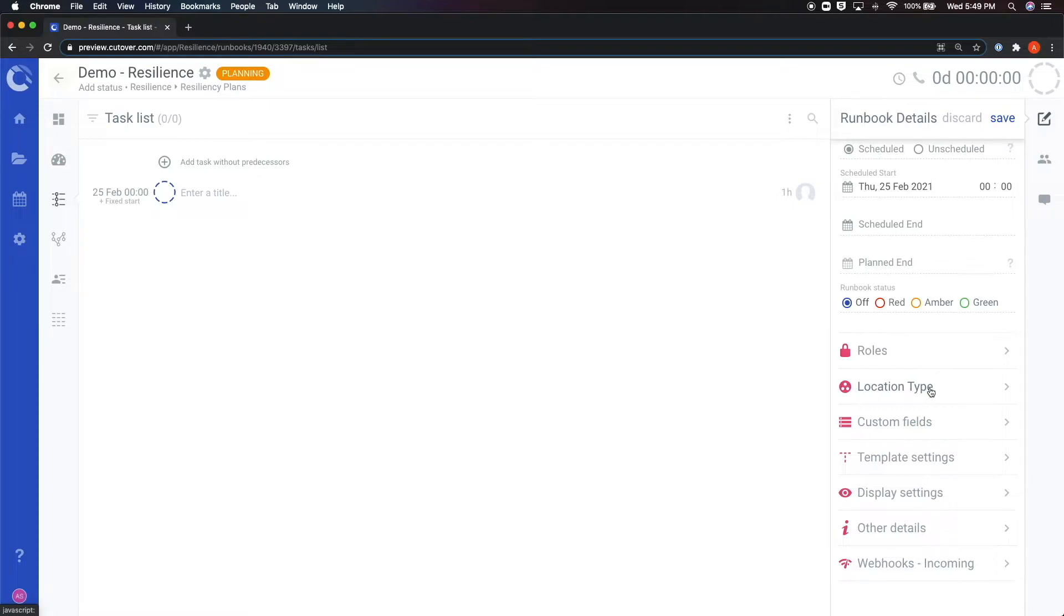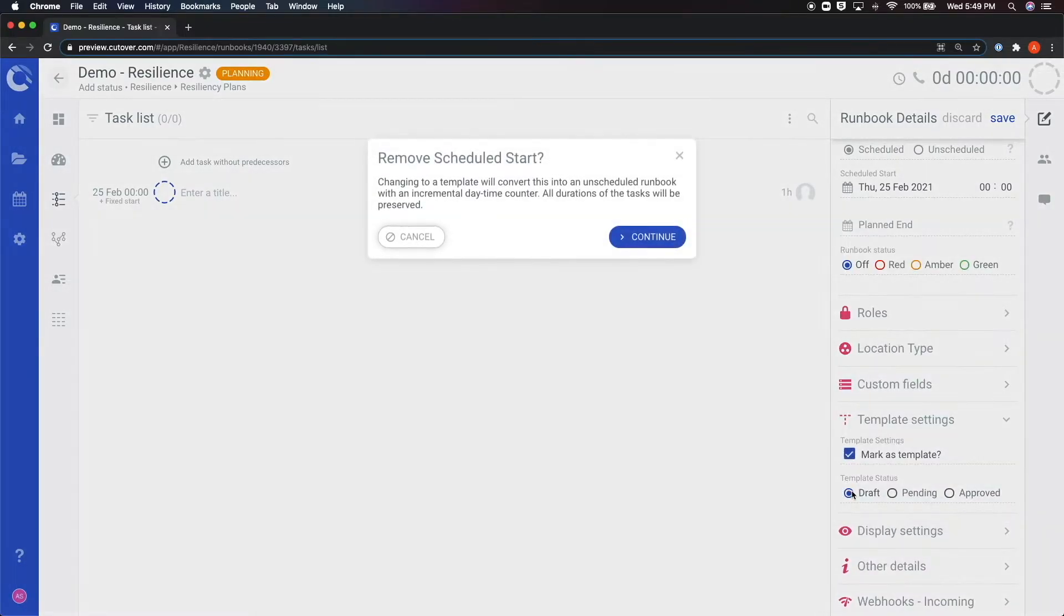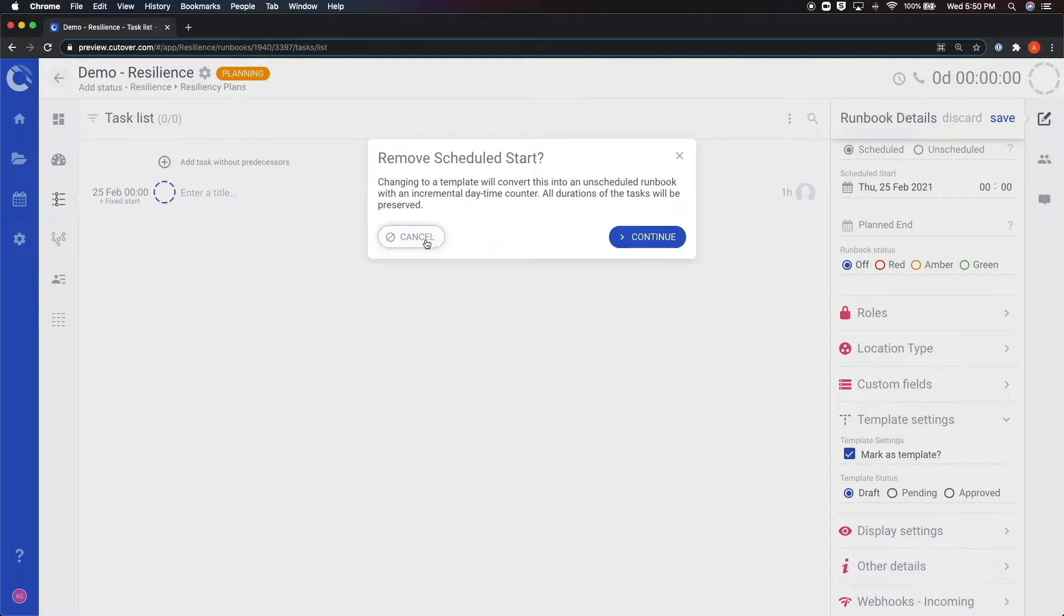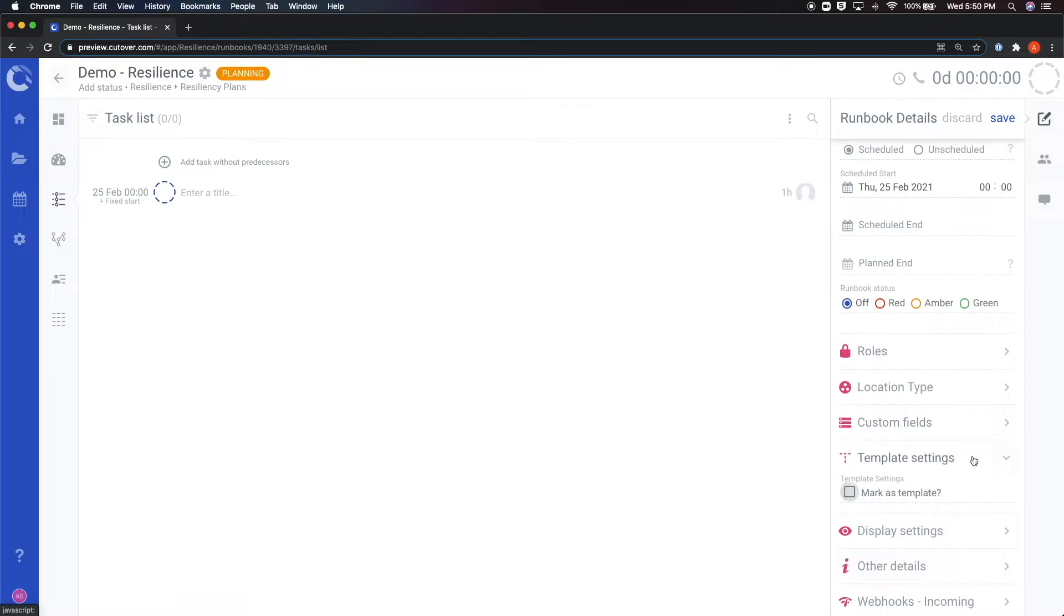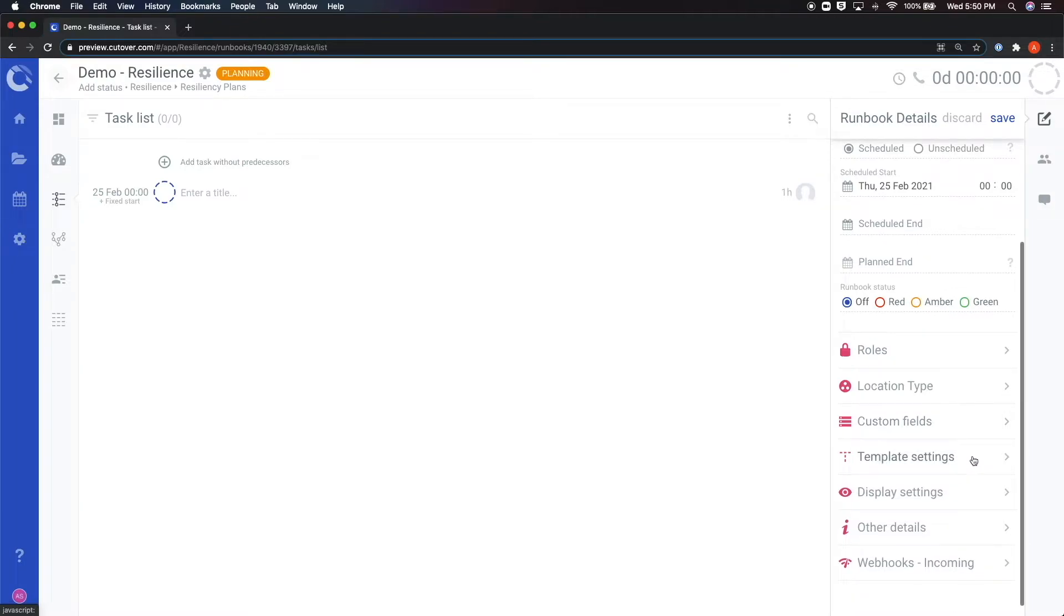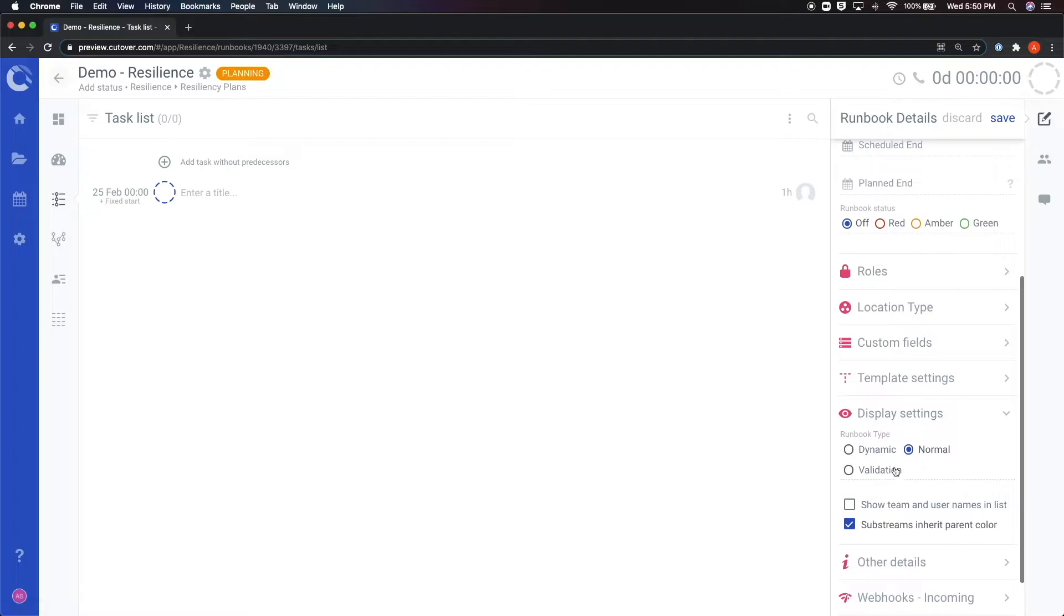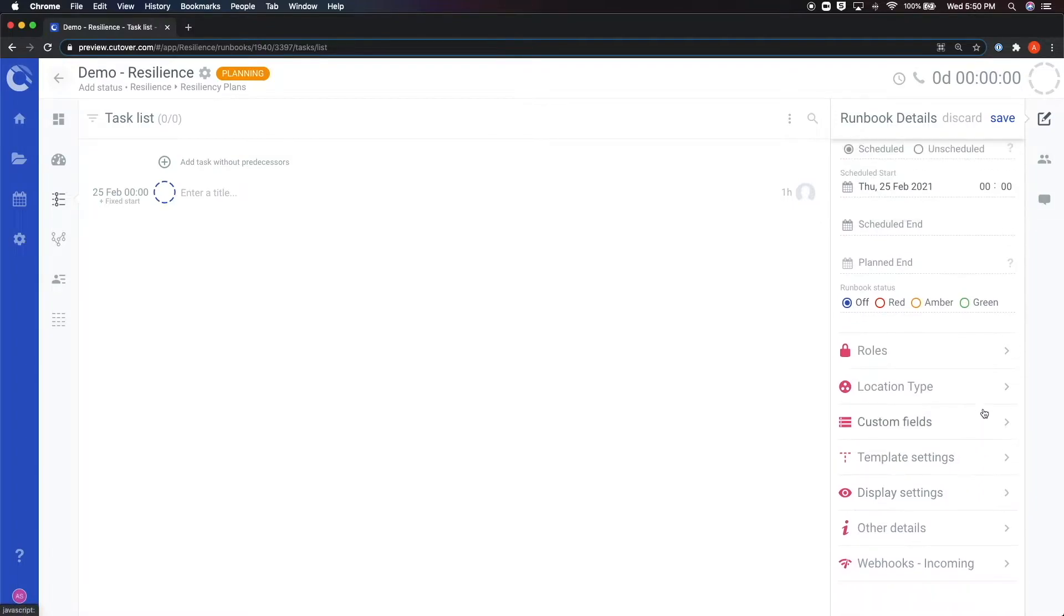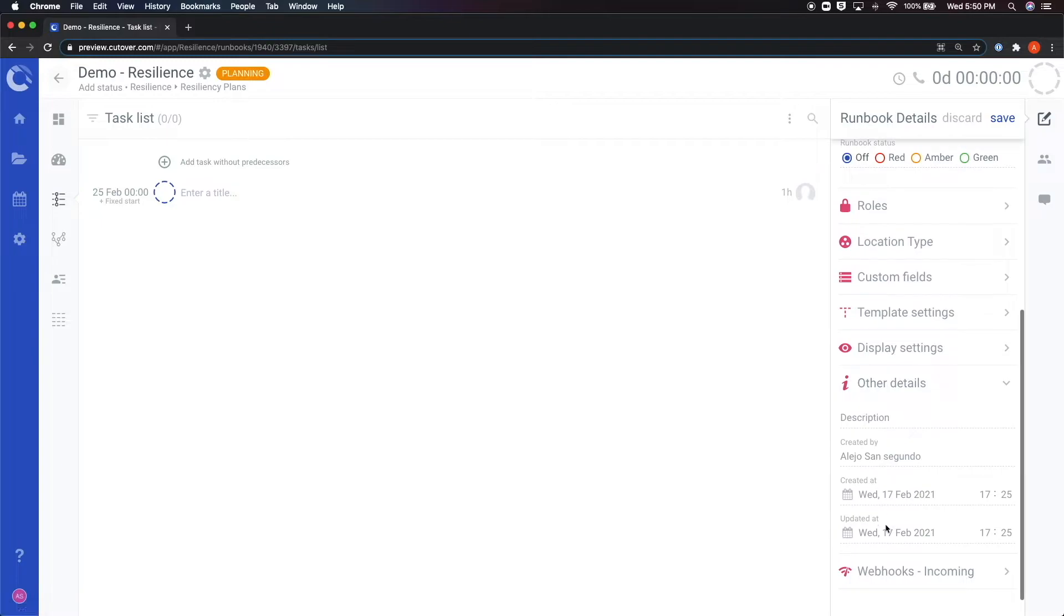From this menu, you can also mark a runbook as a template. Marking it as a template makes the runbook unscheduled but preserves the timing of all the individual tasks. Templates allow you to create drafts that can later be copied and used by other collaborators of the platform, helping them not have to create runbooks from scratch every time. Next, you have the display settings where you can change the runbook type, followed by the details tab where you can configure the timing of the runbook as well as a description of the event.